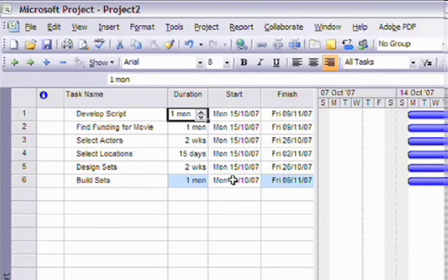Now, what we also can use potentially is we may want to switch all of our durations here to be a consistent unit. And what I mean by that is they should probably all be using the same comparison. So if I use days, weeks, and months, I should probably pick one. Let's say, as an example, we'll pick days. I'd like everything to be in days, just so that it's an easier way to compare task to task. It's a little bit more consistent. Now, if people are telling me durations that are in months or weeks or days, I might want to enter it this way, but now I'd like to convert it.